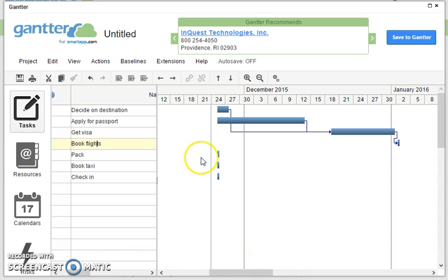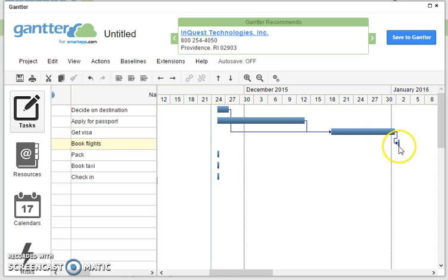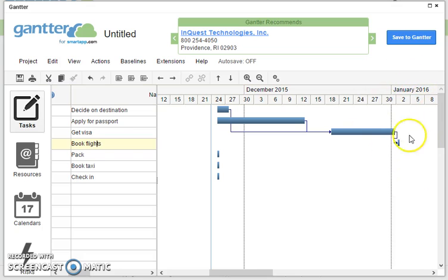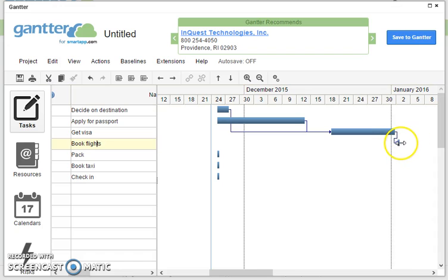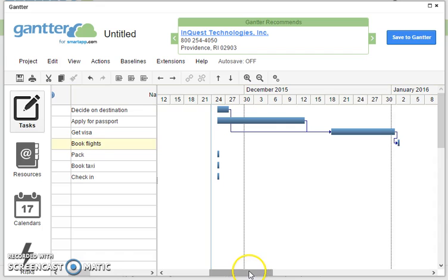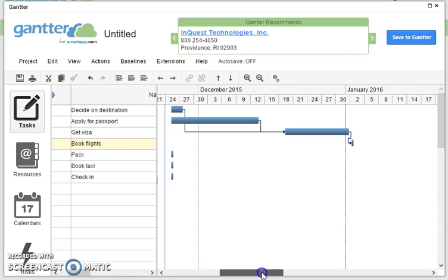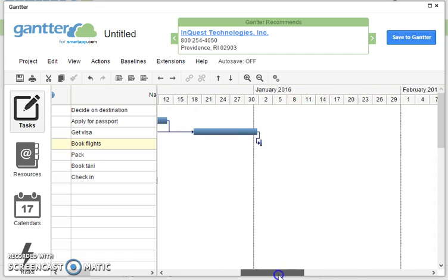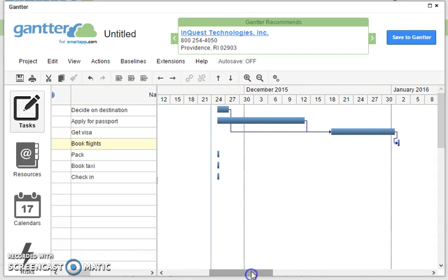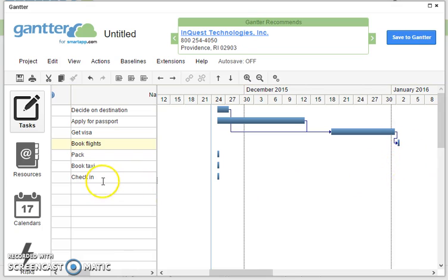Now packing, this is interesting because we could pack directly after we finished our getting our visa and we booked our flights, but actually it might be quite a long way ahead. So at the moment you'll notice all of these tasks are starting as early as possible.